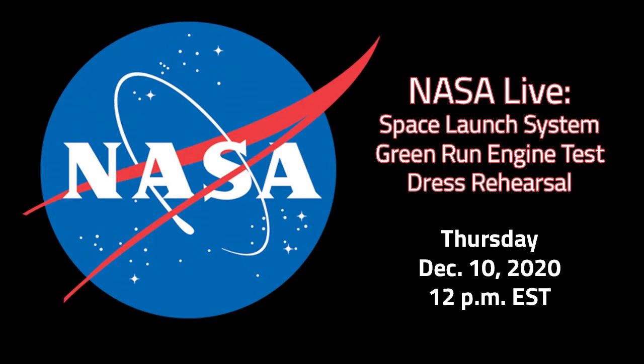For core stage 2 and core stage 3 hardware that's currently in development and production, some of these suppliers are small mom and pop shops, and when they have issues with COVID, with the pandemic, that's really where we're seeing some of the impacts. Boeing's doing a great job working with these suppliers to see how they can help them, especially when they have impacts to their engineering community.